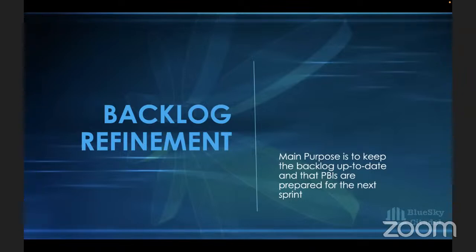We will refine and order the backlog. It is done at the midpoint of the sprint because if it is held too early, maybe on the first day or the second day or the third day of the sprint, the order of the product backlog may change, or the requirements may change, and you may have to hold another session. Imagine if after you refine the product backlog,